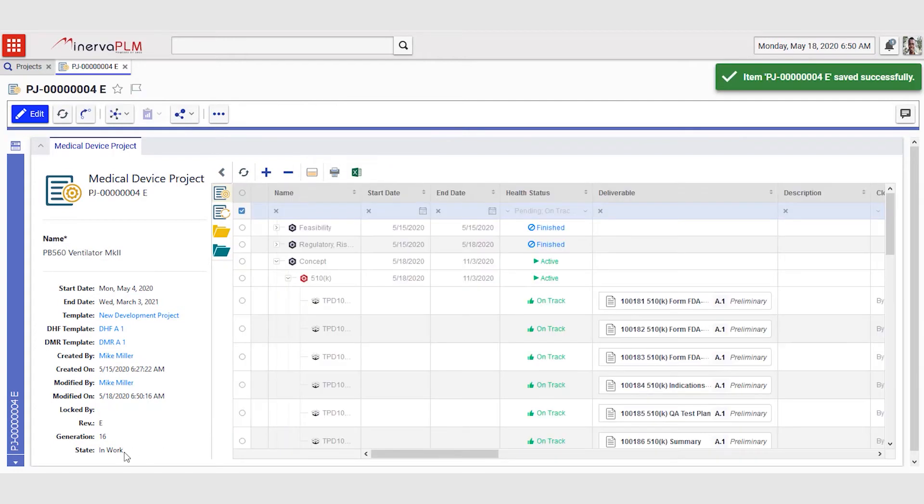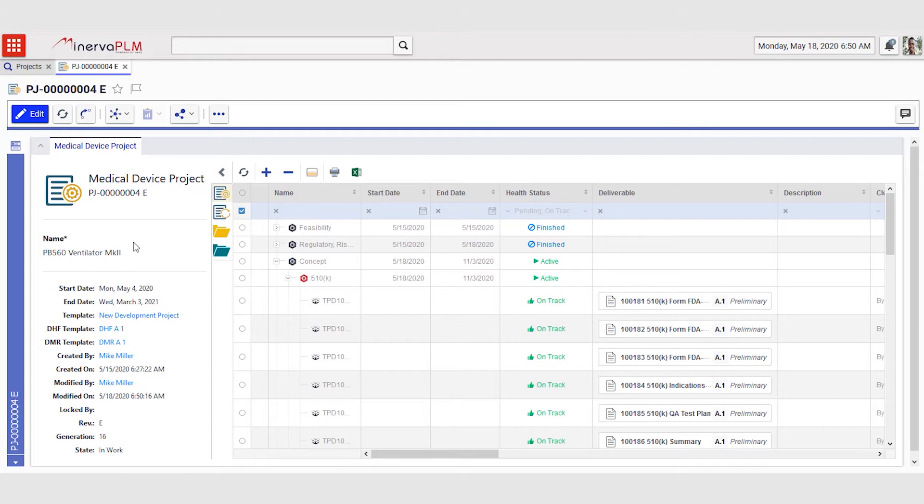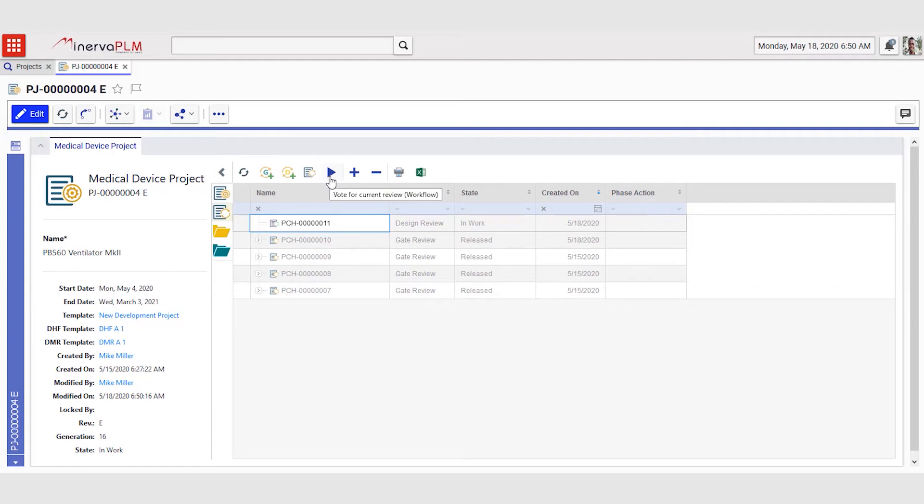The project is still in the status of in work, meaning that this change to the project has not yet been accepted. In order to get that accepted, Mike needs to push this design change into a review step where the steering group can assess the proposed changes and make a decision whether or not this should be allowed.